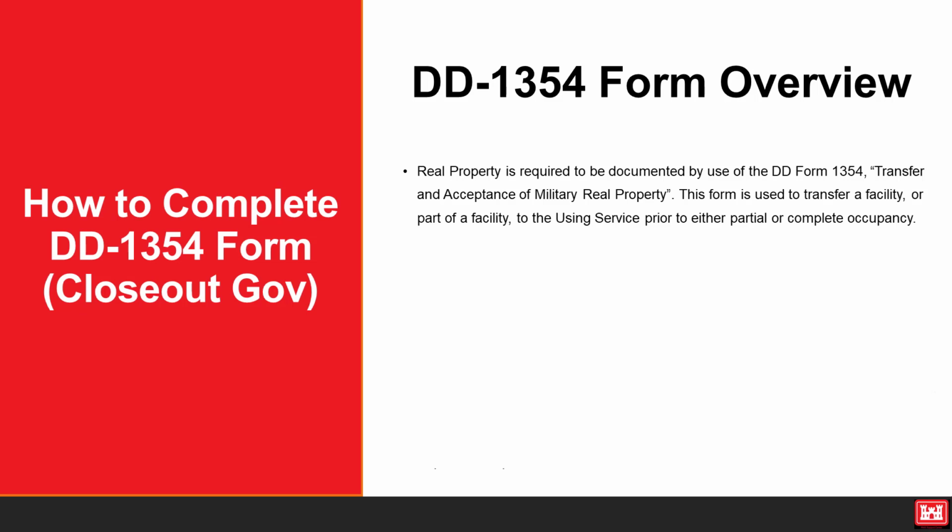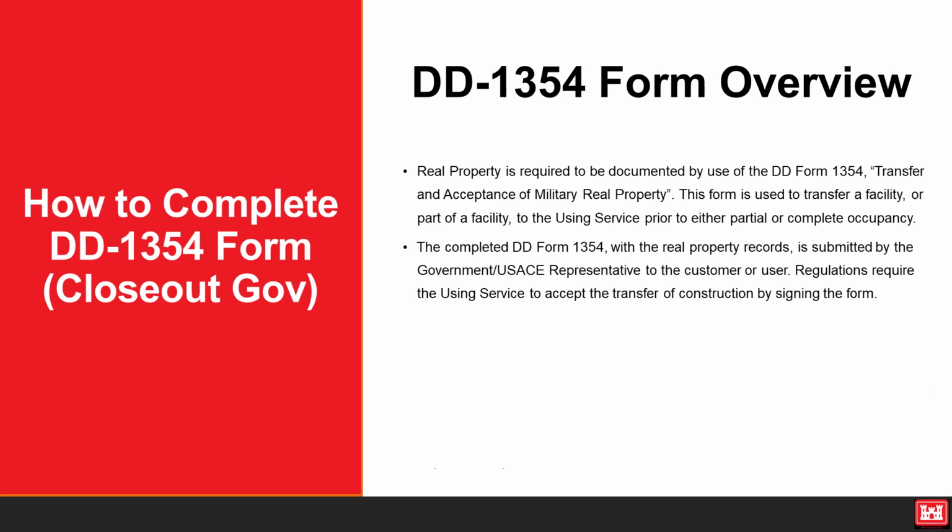This form is used to transfer a facility or part of a facility to the using service prior to either partial or complete occupancy. The completed DD Form 1354 with the real property records is submitted by the government or USA's representative to the customer or user. Regulations require the using service to accept the transfer of construction by signing the form.